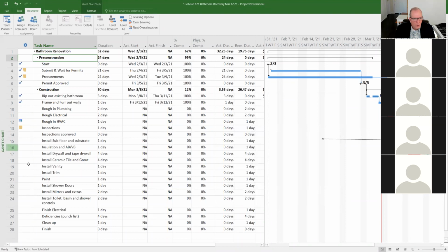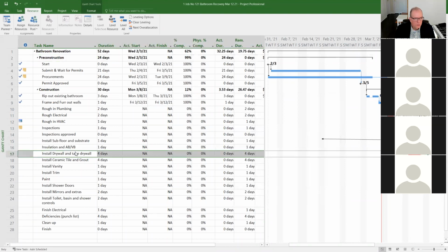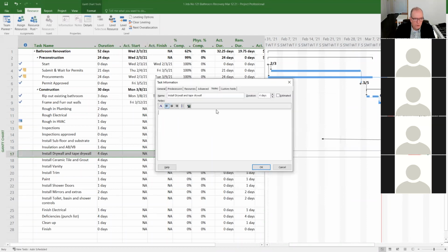And of course, put a note. I would put a note and I would say, you know, confirm with drywall. Well, this is our own people in this case, because I think I assigned the carpenters, ensure Durabond 90, sheetrock 90, whatever you want to call it, used to speed up taping and shorten to 4 days.